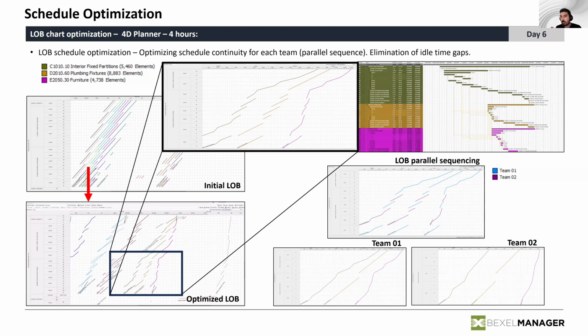by phases, in order to see exactly and to try to avoid possible problems and collisions. We didn't want to have spatial conflicts. We wanted to avoid by any chance having two different teams or two different companies working in the same area at the same time. So that was goal number one.